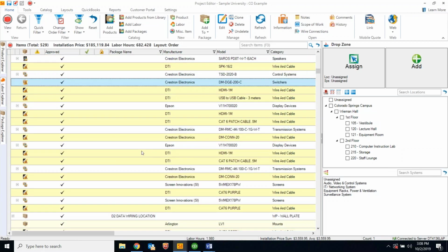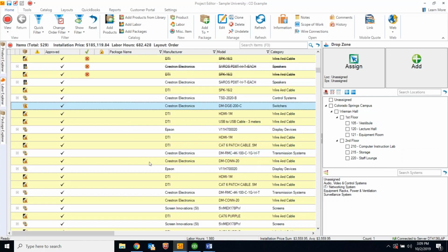Another new feature is a change order placeholder. So that's removing something here, but you don't want the price of the project to change. It could happen, say, on an internal change order. You're taking some stuff out, but it's like, okay, we really didn't use all of this, so I don't need it in the project. We need to remove this. So we had that request, the ability to remove stuff on generally an internal change order. I don't think you'd want to do this on an external change order where you are charging the client but still maintaining the price. But you do have that option.